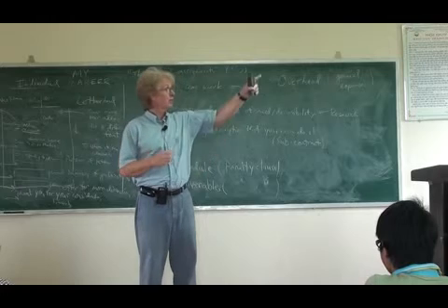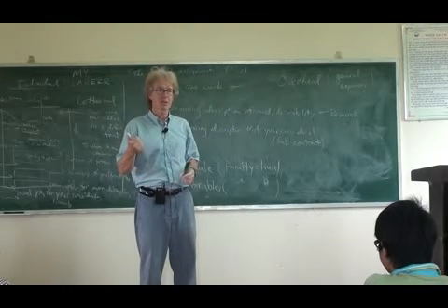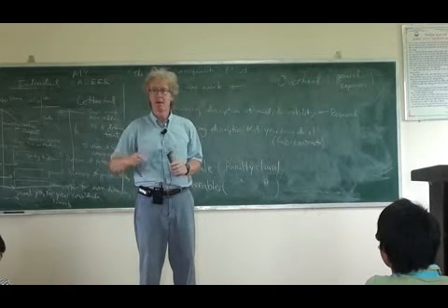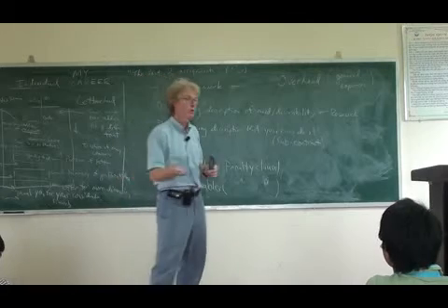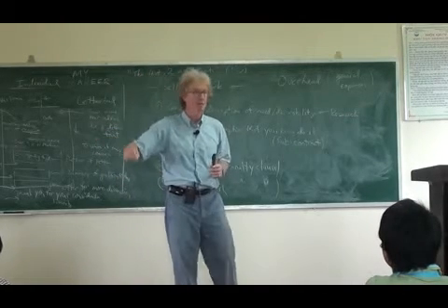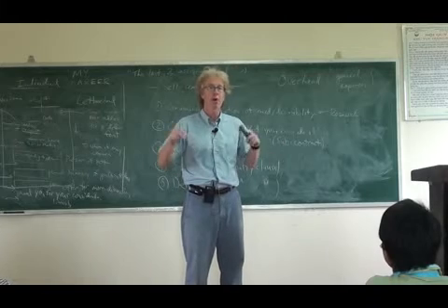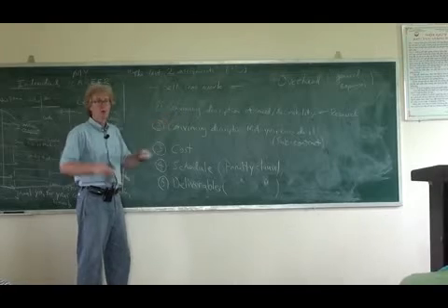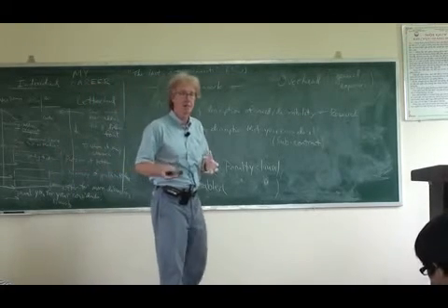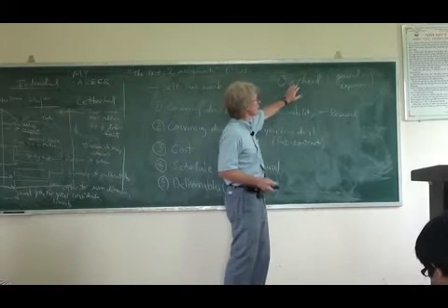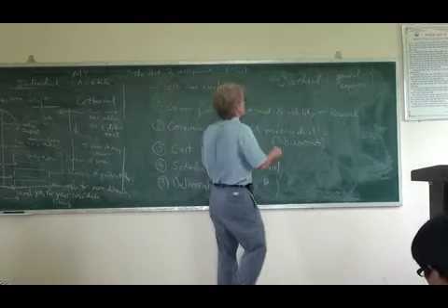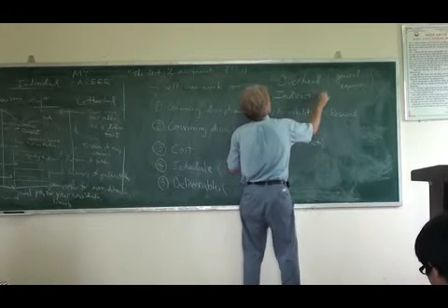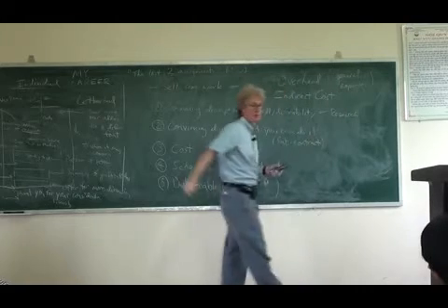And inside of your company, you want to have air conditioning. So that's going to cost some electricity. You want to have lights. That's more electricity. Right? You want to have water. You pay for the water. Maybe you want to have food, have lunch every day, so you hire somebody to bring lunch every day. All of those expenses are part of running the company that aren't really part of one project. So general expenses like that of running a company that aren't part of one project, those go into a category that's usually called overhead. Sometimes it's called indirect. Indirect cost. Okay?